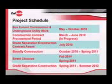To go through the project schedule here for a moment, what's going to begin first is what's called a box culvert and utility relocation that will precede the construction of the main grade separation project. That construction will begin in May of this year, hoping to finalize that award and notice to proceed shortly. That will go through October. While that project is in construction, we are actually in the bid phase of the full grade separation project, and hope to award, and actually need to award that by July for the funding requirements with the state.